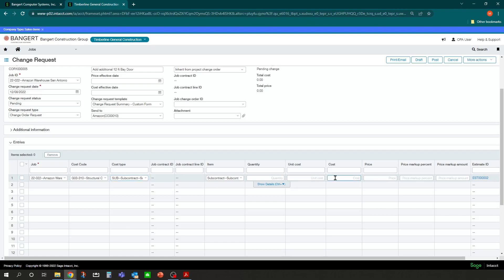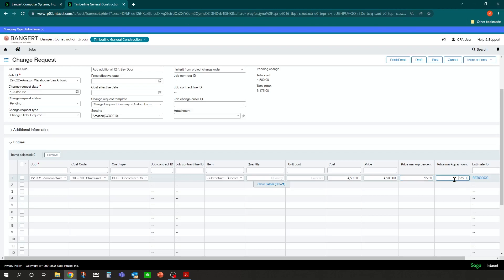So what you can do here is put in your estimated cost in this cost line. So we'll say it's going to cost us an additional $4,500. And you can enter in the price or the quote that we want to give out to the owner for this change. Either by manually keying it in, let's say we're going to charge them $6,000 for this. Or you could list the price the same as the cost. And apply a markup percentage on it. Say we want to make 15% on this. So it'll calculate the $6.75 and you'll notice it up on top that it'll be in the total price is $6,175.